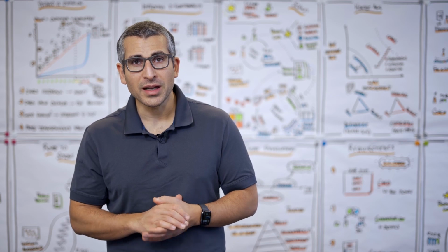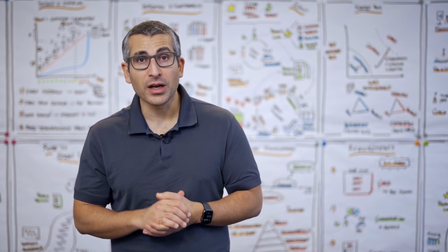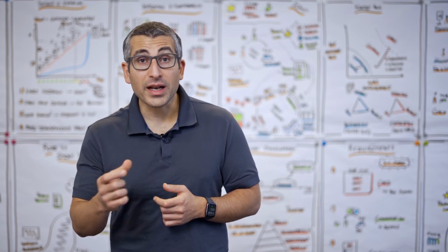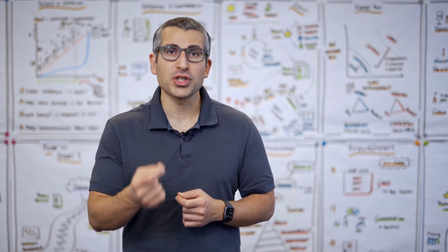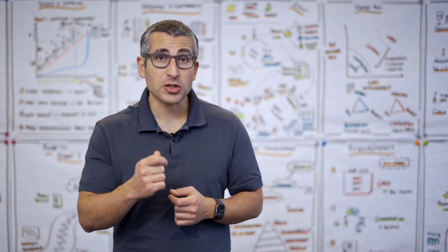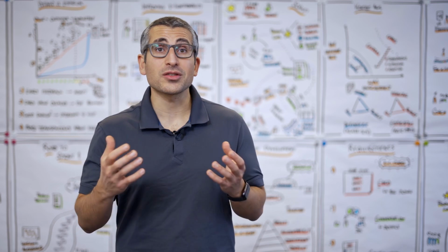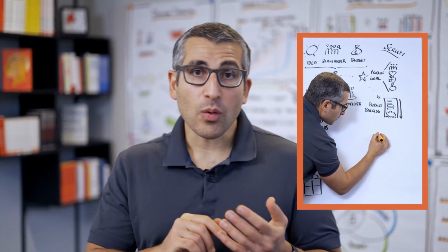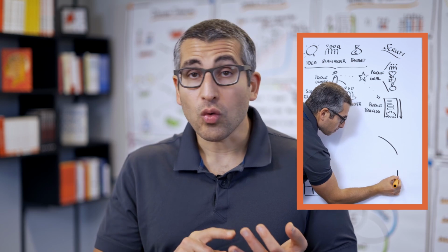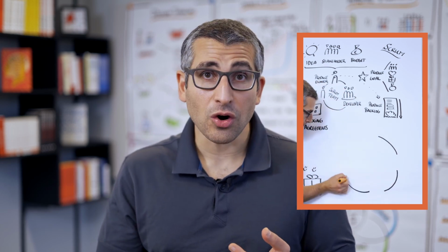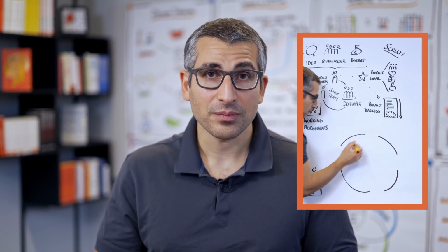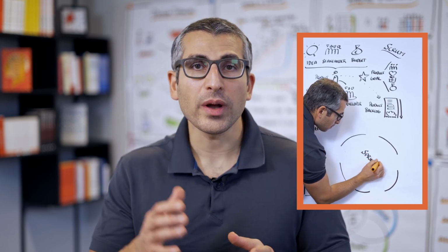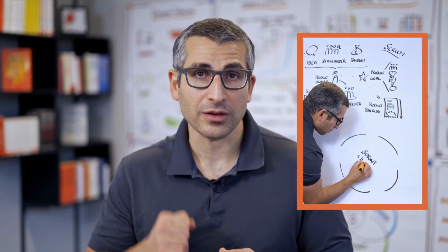Last but not least, we want a product backlog to be estimated, at least the top part of it, so that a product owner can make projections with regards to the next sprint, with regards to the next release towards our stakeholders. Now we have a Scrum team, working agreements, a product goal, and a product backlog. With all of these things in place, we can go into our very first sprint.